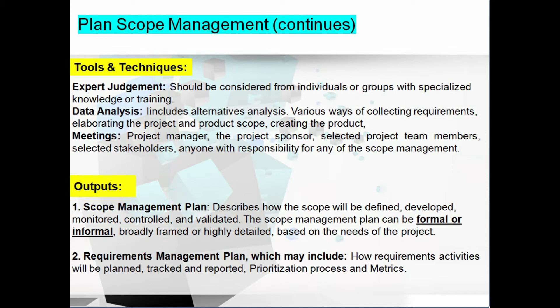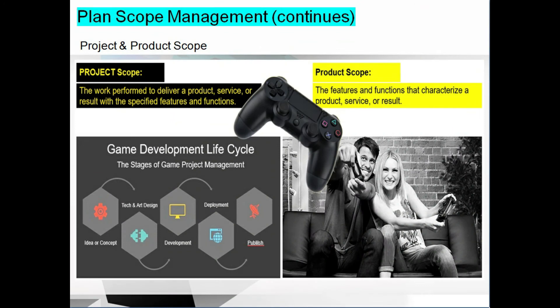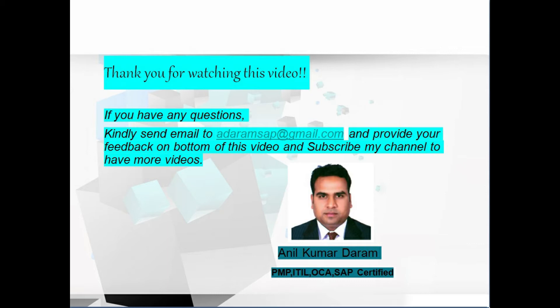To clarify the difference: the work performed to deliver a product, service, or result with specified features and functions is the project scope, whereas the features and functions that characterize the product are the product scope. For example, in a game development life cycle, the stages of project management refer to the project scope, while the characteristics of the product refer to the product scope. We have completed the first process — plan scope management. The next process is collect requirements.